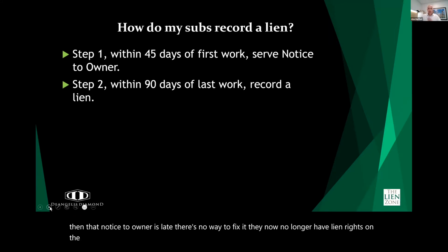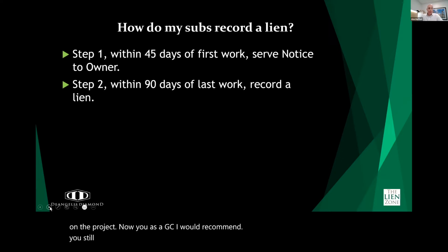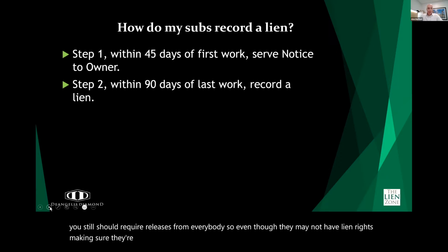Now, you as a GC, I would recommend you still should require releases from everybody. So even though they may not have lien rights, making sure they're paid and getting releases from them is a great way to mitigate risk on the project.